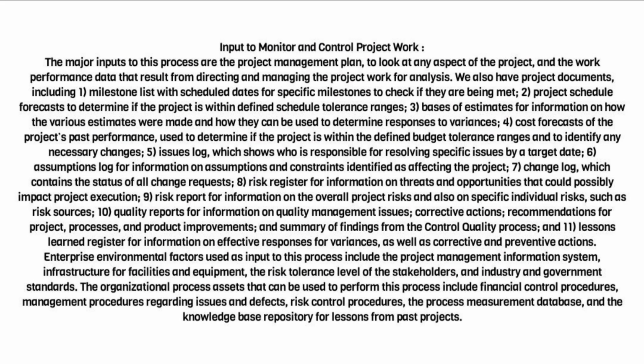Input to monitor and control project work. The major inputs to this process are the project management plan, to look at any aspect of the project, and the work performance data that result from directing and managing the project work for analysis. We also have project documents, including 1. Milestone list with scheduled dates for specific milestones to check if they are being met, 2. Project schedule forecasts to determine if the project is within defined schedule tolerance ranges,